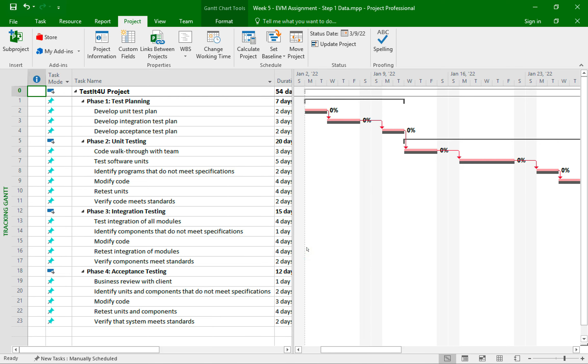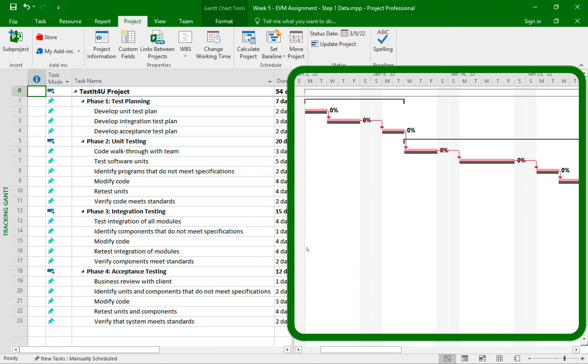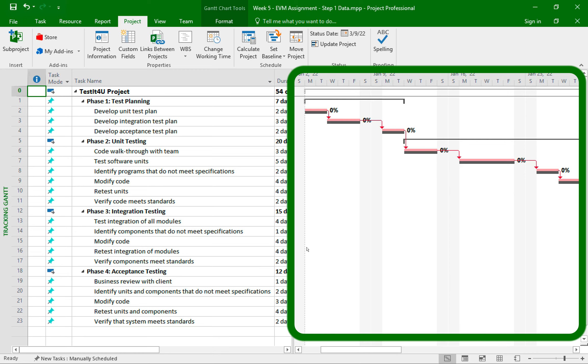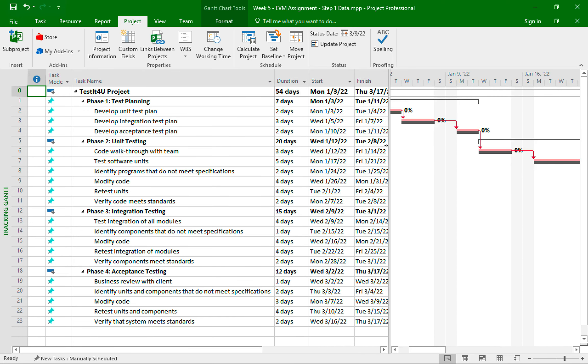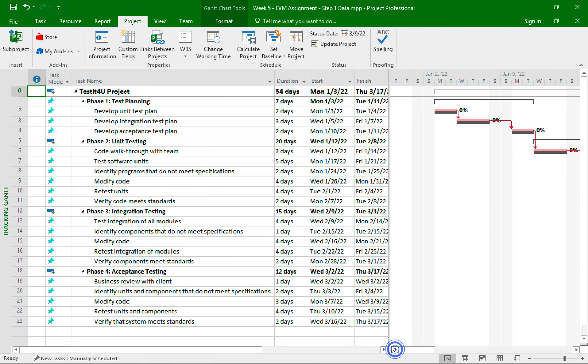The only noticeable change now is in the Gantt chart. We now have two lines per each task. The bottom dark gray line is the baseline, and the top line is the task. Now, they both are the same length because I didn't update the duration or the percentage completion of the tasks yet. And in step number two of the assignment, we are provided with this information. So I now need to input this updated information and I'll start with the duration.